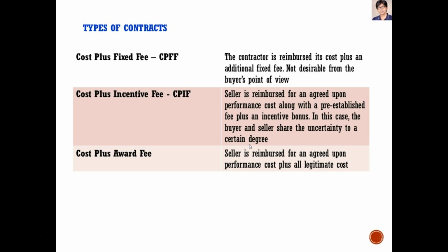That's still a big chunk of money, but the equipment we had, the directional drill alone, was a couple $1 million we had sitting there. And then all the ancillary equipment and people and pipe and the whole schmeal. So the other companies that had been across there just laid their cables on the ground, and every time they would dredge out the shipping channel, they'd get cut. So that was the incentive for that. AT&T said, hey, you know what, go ahead and do it. We don't care. We'll make it a cost plus.